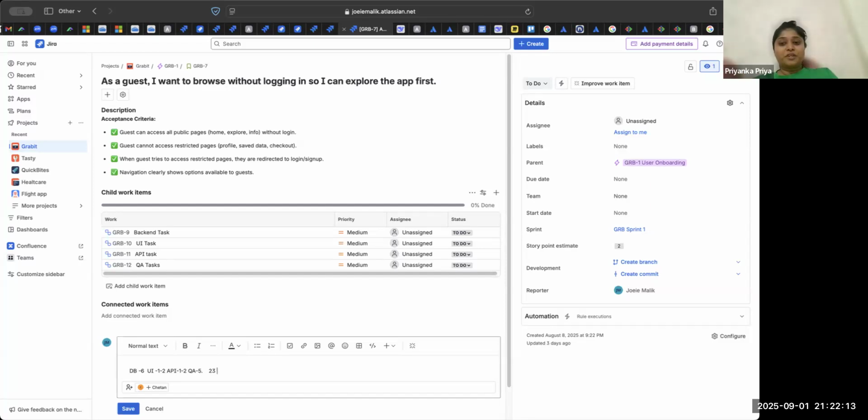So story points, we are telling it at the user story level, not at each task level, right? At task level, you are estimating based on hours. And then whatever hours you come up with, you can map it to the story points. A lot of organizations are into that. So this is called a hybrid approach, where you are estimating in hours. Yes, Abhilasha.